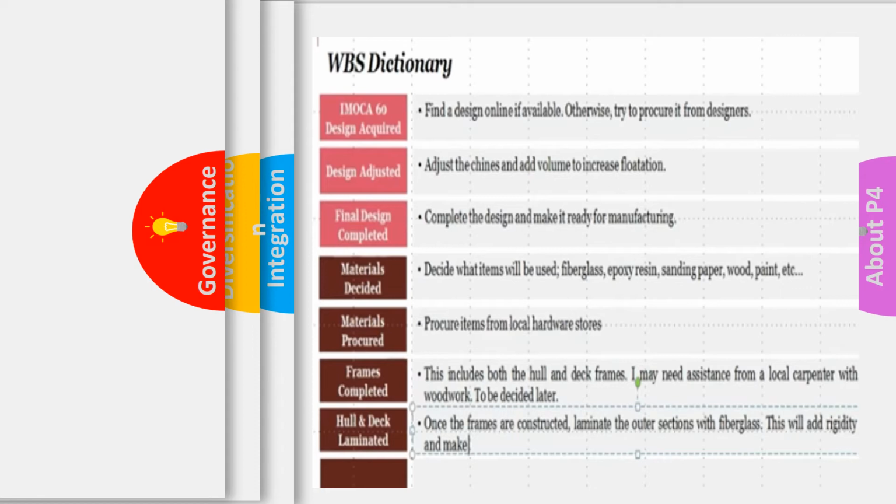Yeah, very, very important. If you ask someone to fix a door onto your house, you're saying to them to fix the door. Well, what does it include? Does it also include putting on the handles and the lock? Does it also include putting on the brackets? Do they need to measure the door? Do they need to fit it? What exactly does it include? Do you understand? So having that dictionary again helps you to clarify, so there are fewer misunderstandings.